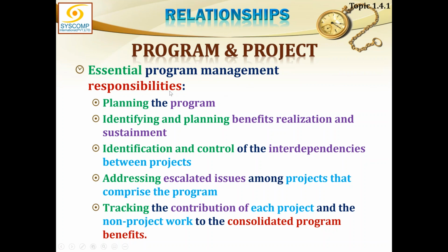Essential program management responsibilities include planning the program, not the project, planning the program. And that is a big job. That is a big responsibility. Identifying and planning benefit realization and sustainment. Again, a big responsibility. Benefit realization is one big job and sustainment is another big job. How it is to be sustained not only during the life of the program, but even after the life of the program. Identification and control of the interdependencies between the projects. That is your job.